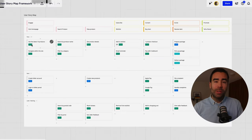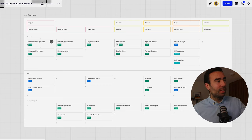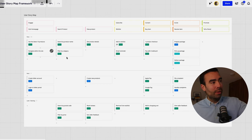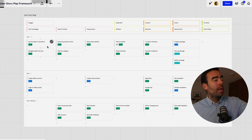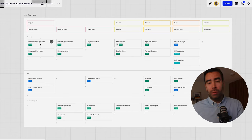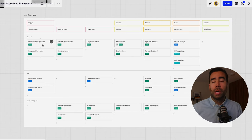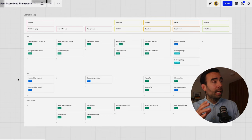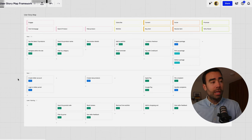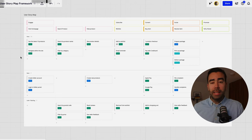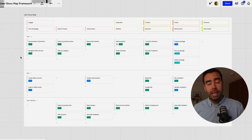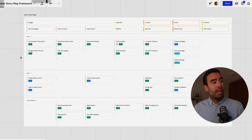Okay so the user story map is finished for now at least we can focus on the first release which is called now and we're going to look with our team how can we build this as fast as possible with the highest possible quality but a user story map is a living document so it's important to keep it up to date and the easiest way to do that in this case because we are working in miro a digital whiteboard is to connect it with trello or with jira or asana because then every update that is done either in miro or in for example jira is synced both ways.